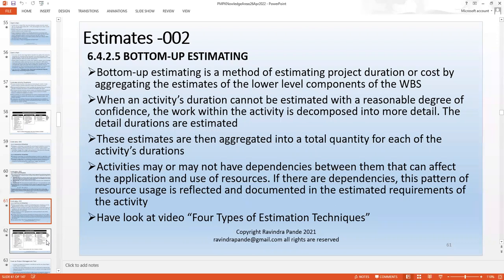Now I can clearly understand how much time the soil moisture calculation is going to take. It takes around 3 minutes if you pluck a soil with that machine, and the machine normally displays the exact soil moisture within 2-3 minutes. So the total process can take anything from 10 minutes or so. As simple as that. Then the other processes, similarly, I can estimate. And these are based on the WBS, the last entities of the WBS. So for a group task, I'll just add up all these WBS last items and try to estimate the main task in a given WBS. And that's how we keep doing.